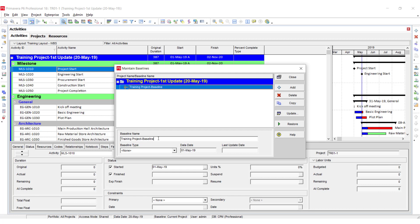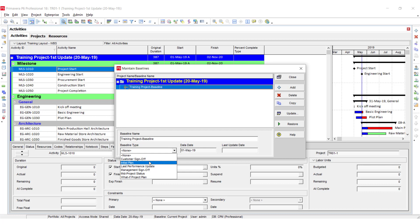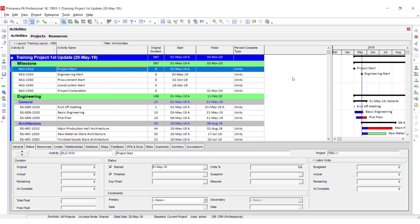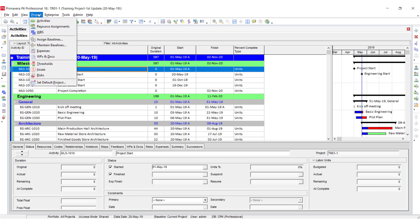You can rename it here as well. There are some baseline types: Customer Sign-off, Initial Plan, Last Performance Update. It's up to you which you want to select according to the situation. I am going to select 'Initial Plan' and the date is the same as the project start. Close it — in this way I have maintained the baseline.